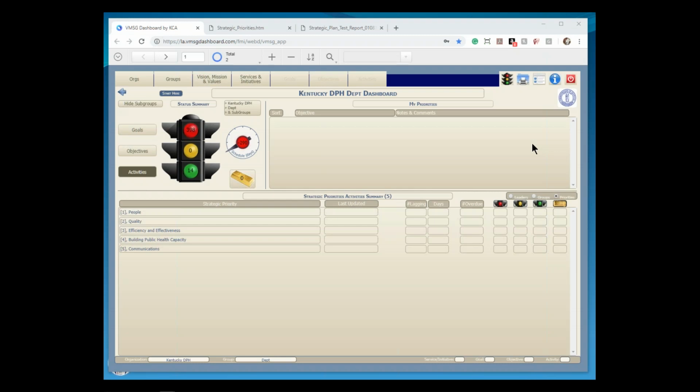No, you set the dates. Any activity, you set the date on. You set whatever it is. If it's a date in the past, it doesn't care. Okay, so I could put on there that it was done in July 2018. Exactly. And what you want to do then is set it on, like, say it was July 2018, and you set it to gold. And what that tells it to do is once it's completed, even if it's a past date, it's not going to include it in any of the calculations for being late, basically. Does that make sense?